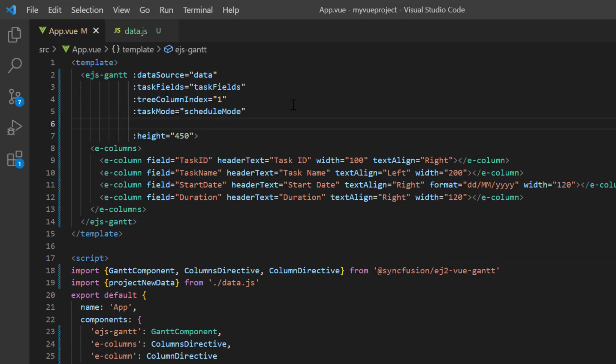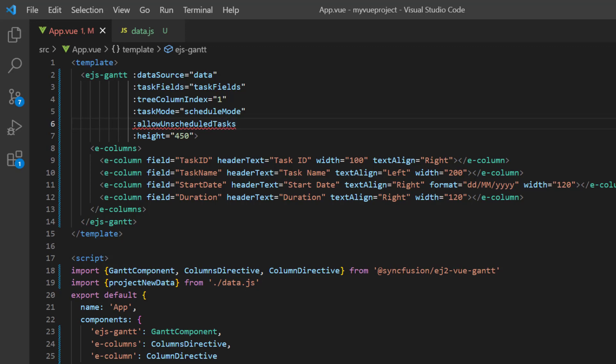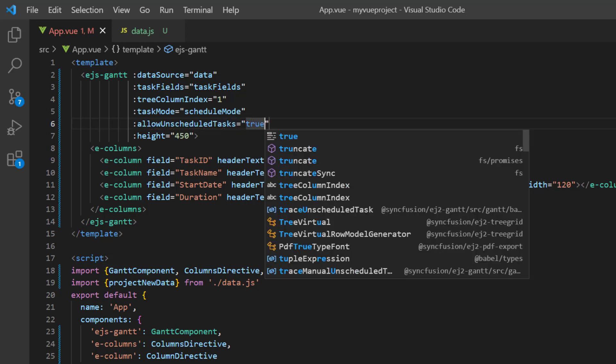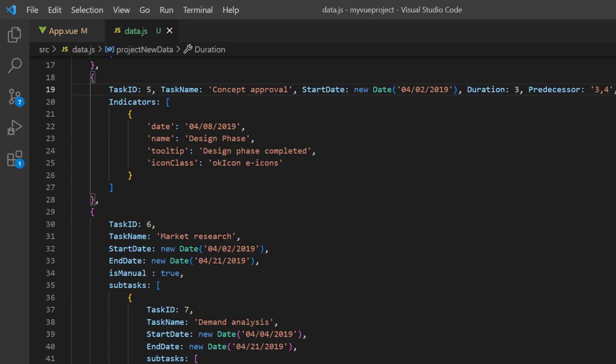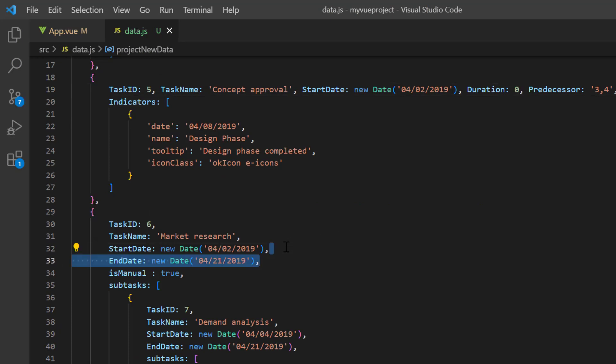To display them, I add the allowUnscheduledTasks property and set its value to true. Then I open the data.js file and change the duration to zero for task five and remove the end date for task six.